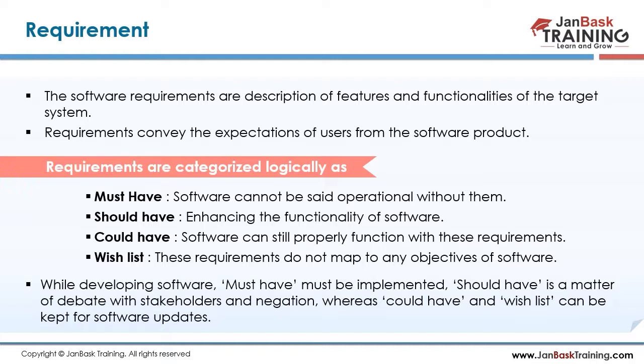So this is how we categorize the requirements coming in from the client: we document them all and build them into categories. These categories are not built in the functional requirement document or the BRD. This is done in a separate Excel that we usually create, where we put down the functionalities. In the must have, we want the dashboard, the products, their advertisements, their pictures and everything. In the should have section, we have the pictures, dashboards and payment gateways. This is how we categorize the functionalities in each quadrant.